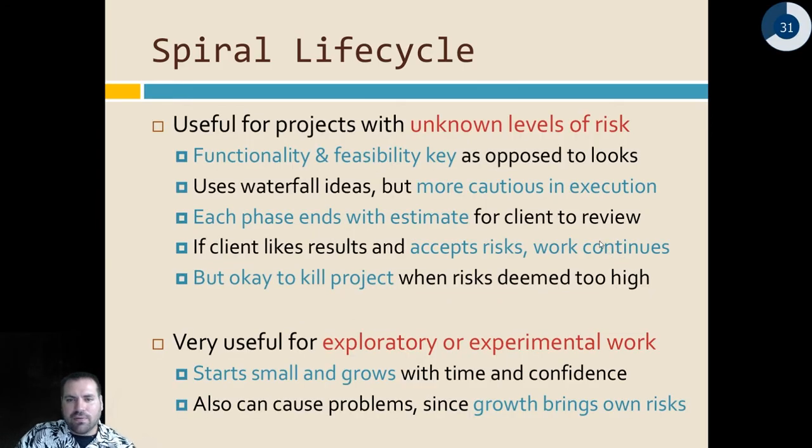So this is great for very risky projects. If you have some very experimental idea that you might want to work on with a client, then you can keep going back to the client and saying, hey, it was experimental. We did some analysis, and we found out that you're going to have all of these costs that we didn't foresee in the first meeting. And then they might say, oh, those costs are unacceptable. Let's kill this project. Or, no, these costs are fine. Let's go one more step of the spiral. Talk to me on the next step, and then with a new revised estimate, and so on.